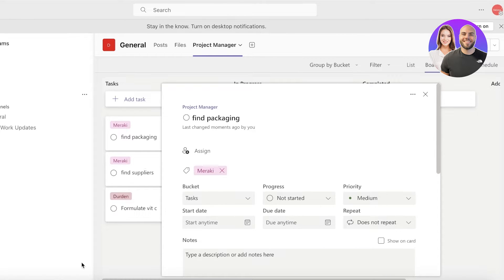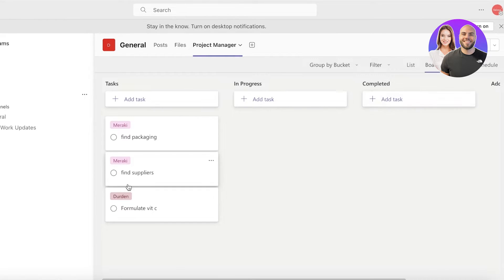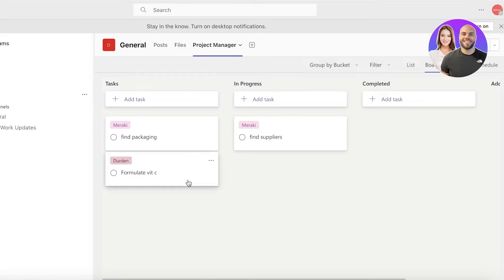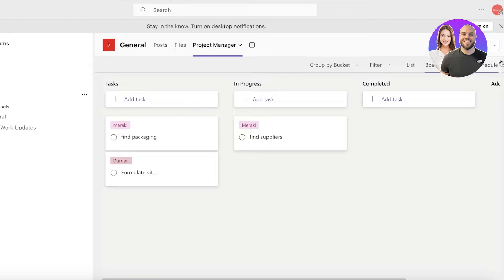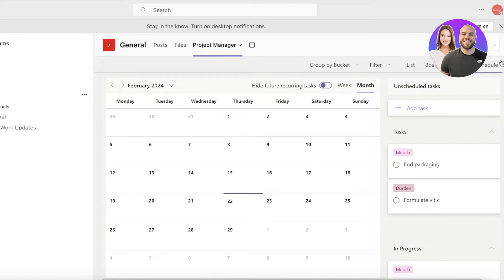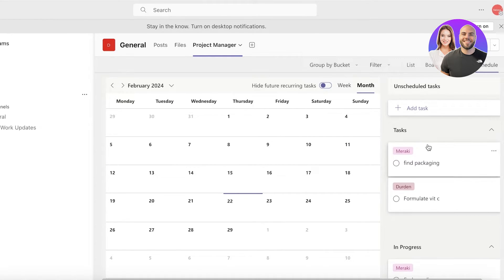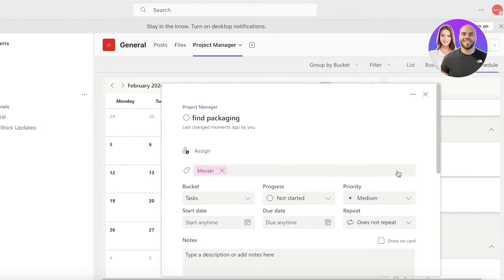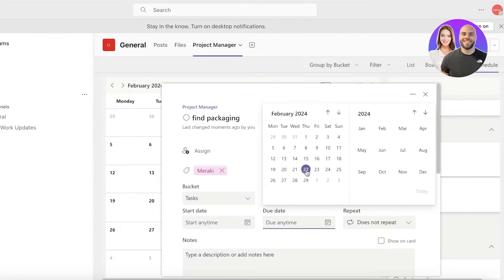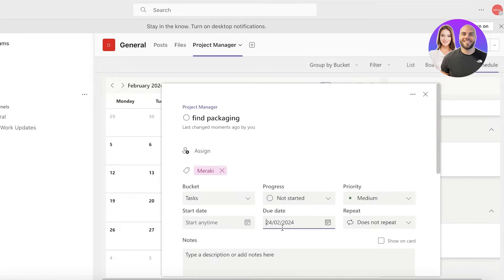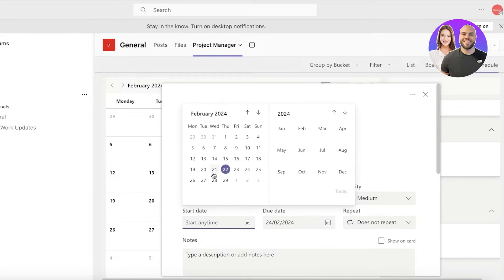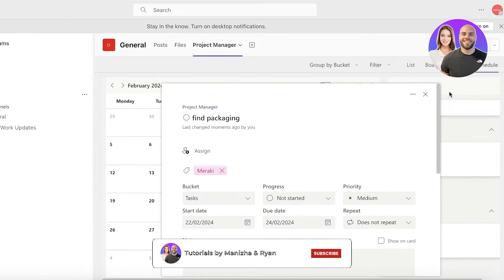Now after that, if I'm starting on a particular task, let's say I am finding suppliers, so I can move that in the in progress bucket. However, another great feature that I like to use is going into the scheduling section, and then we have our unscheduled tasks. So these are tasks that are just added in a bucket but they don't have a particular due date.